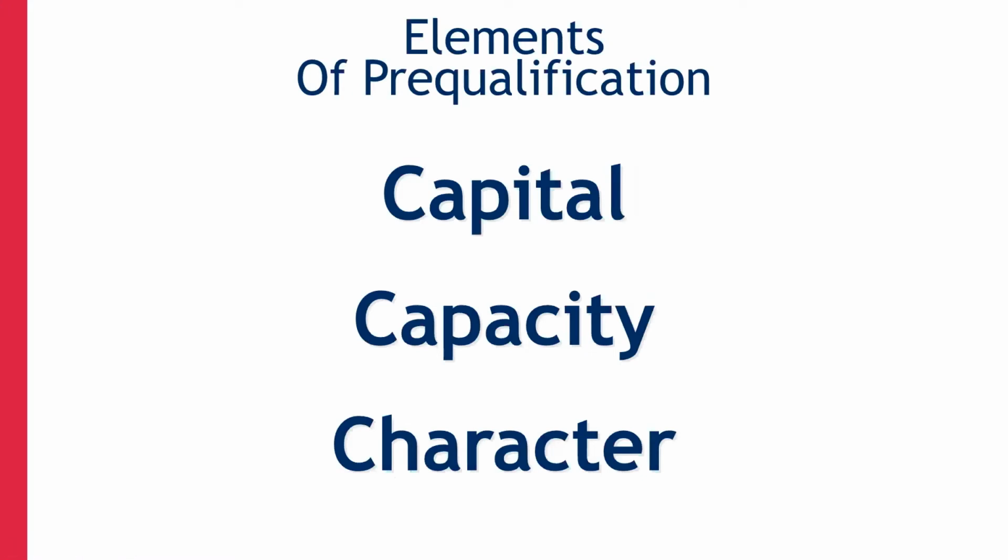So these are the three driving elements of the bonding process. Really, there's almost a fourth and maybe even a fifth, depending on your circumstances. But really, the first is capital, which is essentially the money, the cash, the receivables, the underbillings, and any sort of property, PP&E, property and equipment, anything that you have inside the business.